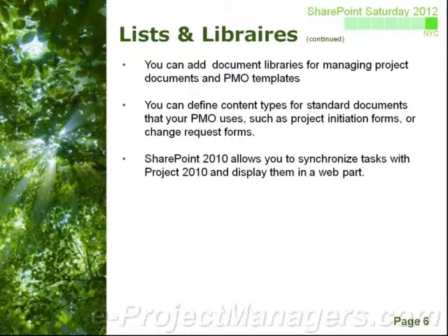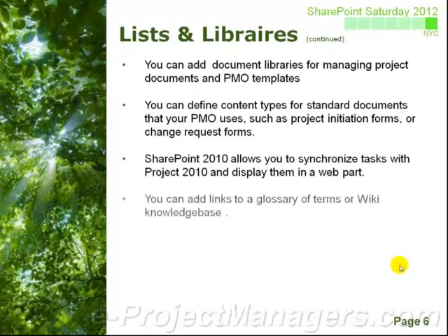One of the nice things about SharePoint 2010 is it also allows you to synchronize tasks with Project 2010 and display them within a web part. So you can have access to view the current information in your project schedule literally in your team site through a web part. You can also add links to glossaries of terms or wiki knowledge bases to help you manage communication.